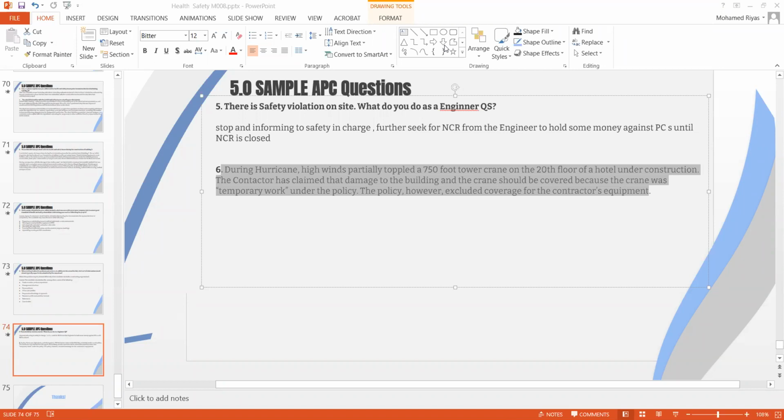A CAR policy usually comes with certain exclusions. One of the exclusions is clearly any material changes to the project. The material changes include variations. As the best practice, all variations should be notified to the insurance company, and accordingly they will update their records. If you are signing a new variation order which is in different plots, you need to obtain an endorsement from the insurance company specifying the different plot numbers. So you will not be disappointed if any claim comes. So this is the best practice.